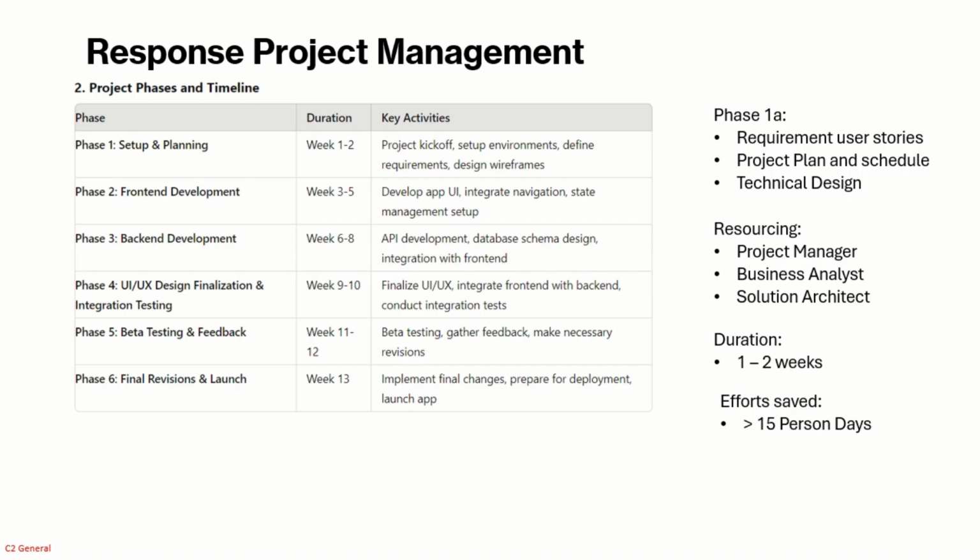To complete these tasks, the resourcing that would typically be required would be, at a minimum, the project manager, the business analyst, and the solution architect. Maybe include a tech lead as well. The duration of these tasks that we have performed would easily be 1 to 2 weeks. And all of that has been achieved using AI in the course of a Sunday afternoon. The effort that we would have saved is at a minimum 15 days' worth, and you can estimate the kind of costs that you would be saving by using AI.